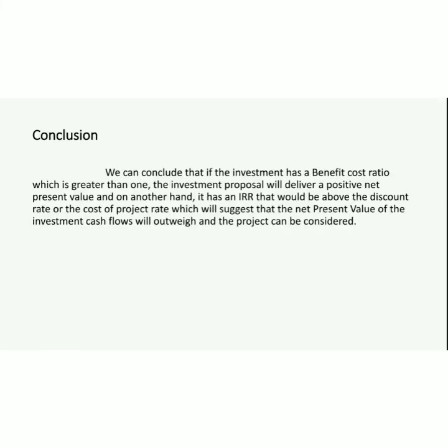We can conclude that if an investment has a benefit cost ratio greater than 1, the investment proposal will deliver a positive net present value, and on the other hand it has an IRR above the discount rate or the cost of capital rate, which suggests that the net present value of the investment cash flows will outweigh the costs and the project can be considered.